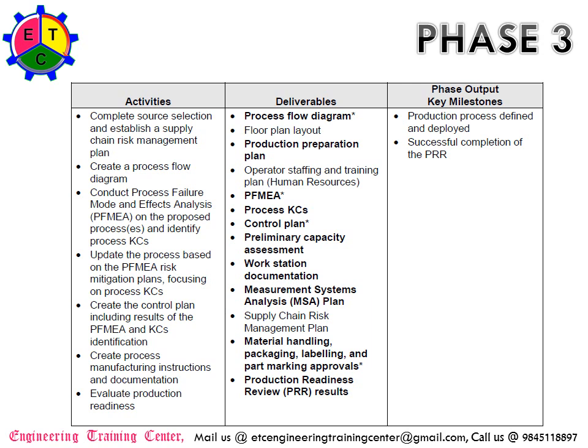Additional deliverables include supply chain risk management plan, material handling, packing, labeling and part marking approvals, production readiness review, and PDR review results. The major deliverables in Phase 3 are essentially getting ready for production. The concepts are frozen at the critical design review — concept is ready — and in parallel, production is made ready through risk analysis, since the team has been involved from Phase 1. This allows you to do process flow diagram analysis, identify risks, put mitigation plans in place, control key characteristics, complete preliminary capacity assessment, workstation documentation, MSA, material handling, packaging, labeling, part marking approvals, and production readiness reviews.